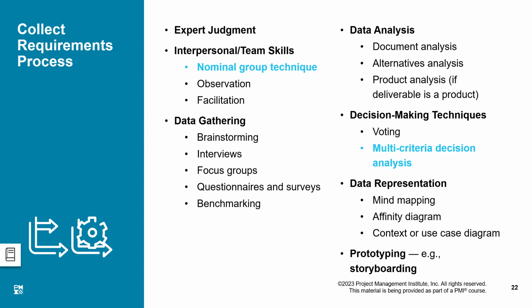Mind mapping is a technique where, just like a work breakdown structure, we break down a thing into various options and keep breaking it downward. Here we put the main idea in the middle of the paper and expand around it. The main topic is in the nucleus, and then we expand around it.